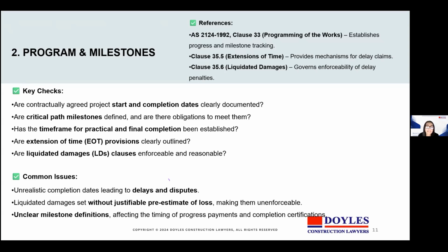What we find is unrealistic programs create sort of automatic liquidated damages exposure. It's really important that liquidated damages are reasonable and tied to real loss, and extension of time mechanisms actually work. So it's worthwhile that you pay close attention to those.